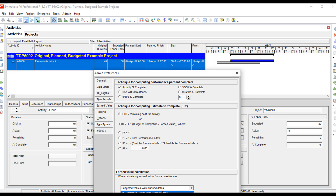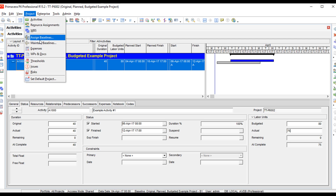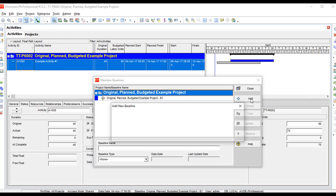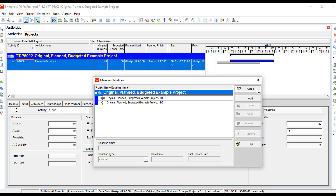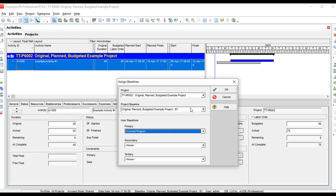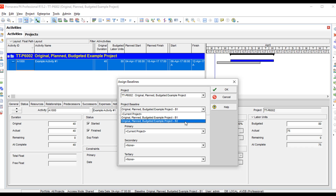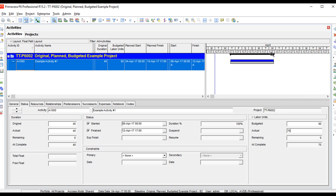Now I'll change the setting to at completion values with current dates. Notice it doesn't change the current view — as mentioned, this setting must be in place before creating the baseline. I go to Project > Maintain Baselines, add another baseline saving a copy of the current project. Then I go to Project > Assign Baselines and change to the second baseline created using at completion values with current dates. Now there's no variance.